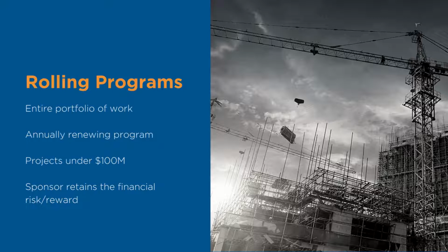Rolling OCIPs and CCIPs typically support projects under $100 million in construction volume, as a project of that size generally cannot support the premium required for a dedicated CIP. As with single project placements, the sponsor retains the financial risk reward for the program.